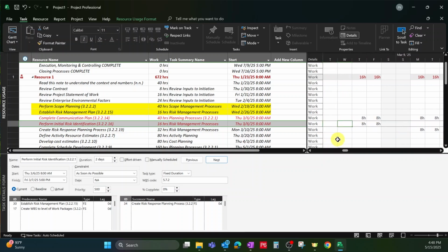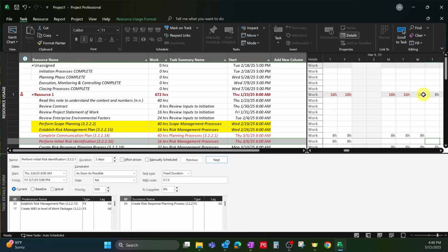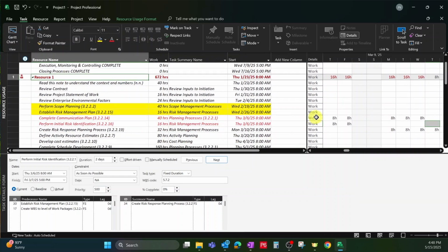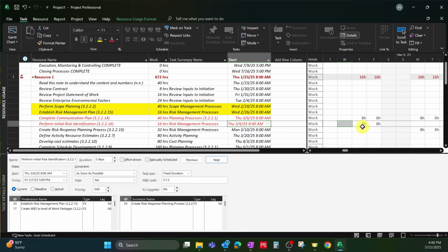It may work or it may not. You really have to work with your teams when you're moving these things and say, hey, if I move this, are we really pushing out the schedule too far, or how does this affect things? You're just looking at it from strict data, or you can go in here and change these resources to work longer hours. We've had a video on that, but you can change the working times for your resource, or the number of individuals working.